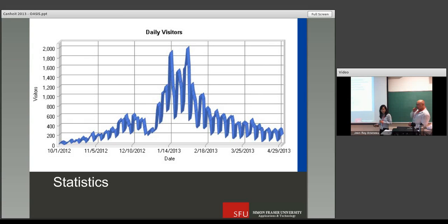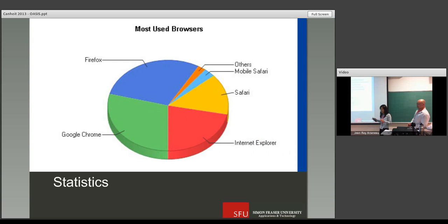We were also really diligent in getting the departments to be there during the analysis and design phase, because of all the different departments and their different processes. We really wanted to make sure that the departments were all happy and ready to move on to the system. So we held information sessions, training sessions, and sent out newsletters, and we made sure there weren't any surprises when we went live. Even though a lot of the users said they didn't need the training, we made sure that training was mandatory before they were given access to the system.